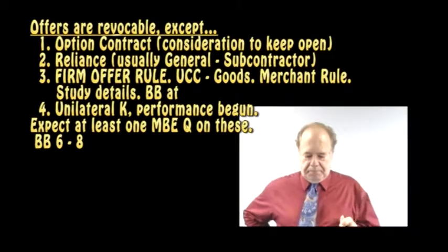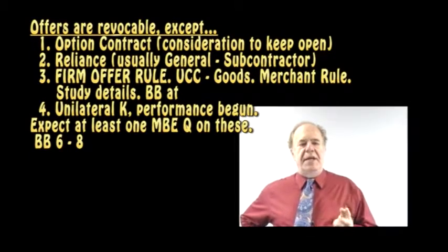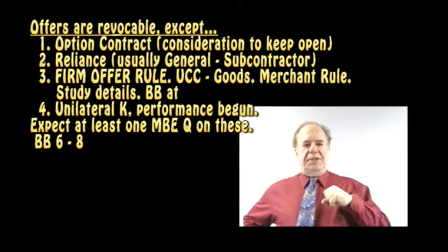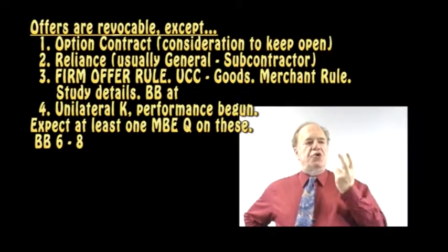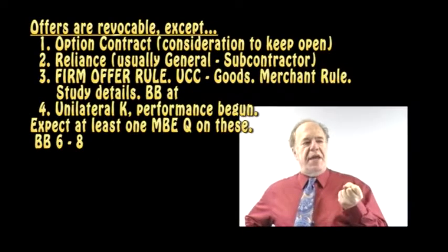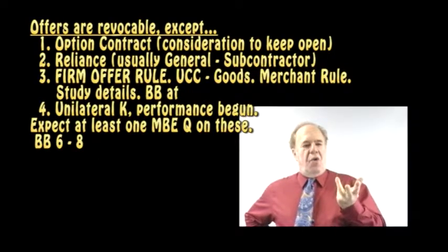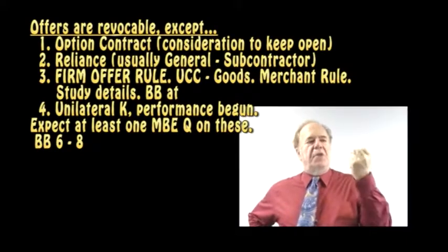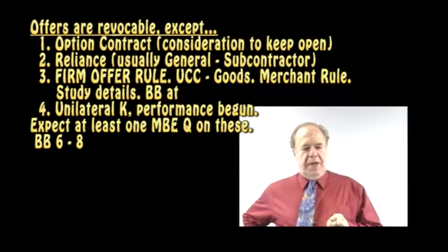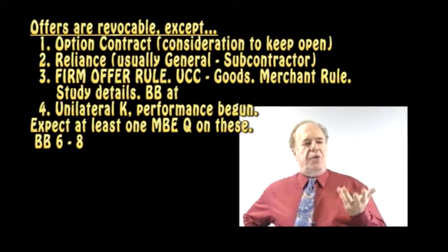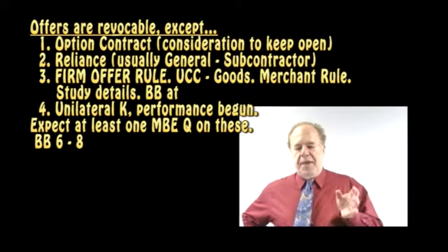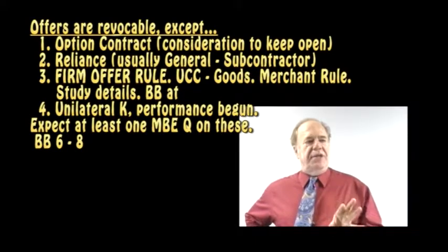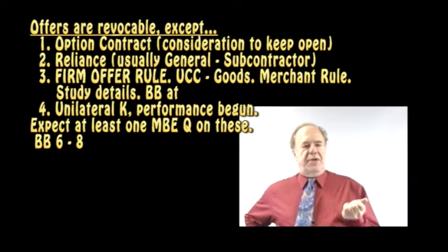Third, if an offer is made in circumstances that the offeror should have realized the offeree might rely on the offer, and the offeree actually does rely on the offer, then the offer has to stay open for a reasonable period of time. This occurs mainly in, you'll see it in contractor-subcontractor cases.